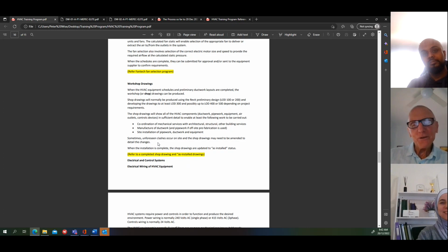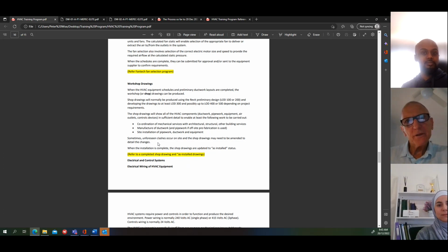We said, "Well, you know what you can do now? You can take it out again," because it clashed with everything that we were going to be doing in the plant room, and he had just ignored that coordination process. And so he lost. He tried something on and he lost. So it's not worth it. You've got to communicate with other people and collaborate and work together so that everyone can get their job done most efficiently and at the lowest cost. Because for that plumber who had to pull his pipe out, it would have cost him many thousands of dollars to pull that out and reinstall it in the right location.